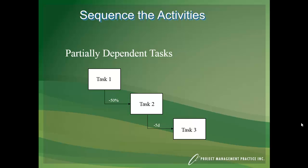But in the lag field, we can type in minus 50% or minus 5 days or half the duration. If you put positive values, then you'll create a gap between the tasks. So wait 5 days before you start task 3, for example.